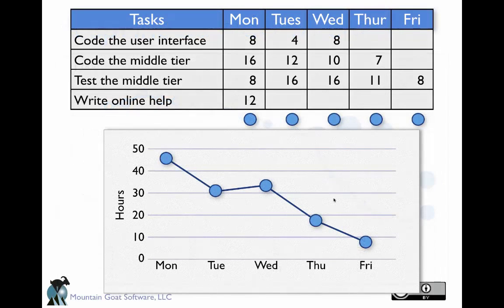So take an example, let's say at the beginning on Monday, all of this counts together as something like 45 hours. So on Monday, say 45 hours are remaining. Tuesday, you count it all together and say, okay, that's roughly 30 hours, so you take down the 30 hours. Then Wednesday, you see problems with the interface pop up, so you add another hour. You see actually the line goes up. You say, are we going to make it by Friday? This here looked good. This straight line suggested we were already done on Thursday, but no, this gave problems. But then we see, okay, as time whittles down, we can see the speed of how we're moving. Okay, let's move through this.